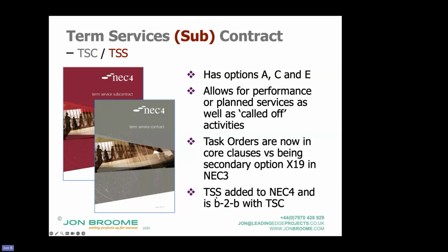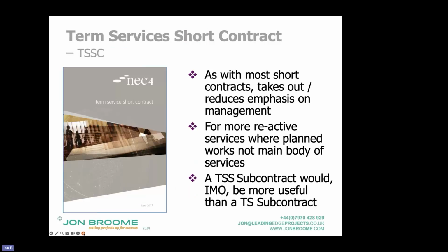And the term services subcontract is added to NEC4 and is a back-to-back with the term services contract. So exactly the same, except the service manager and the client become the contractor, the contractor becomes the subcontractor, timescales change, etc. You've got the term services short contract as well.